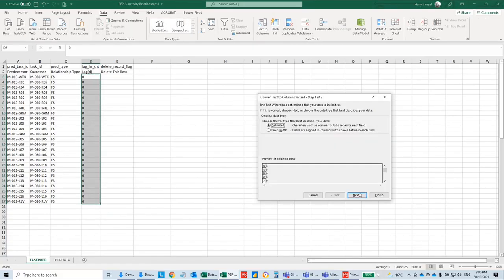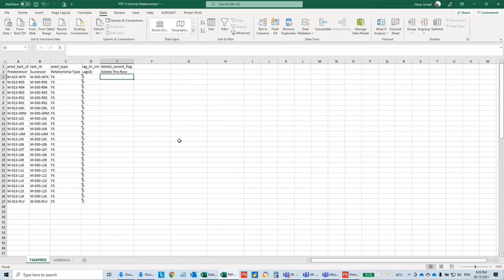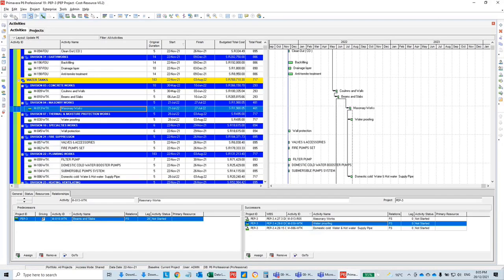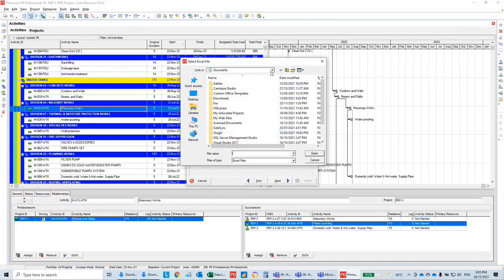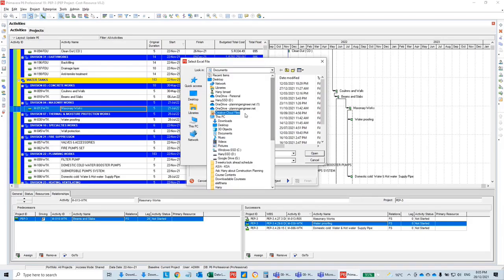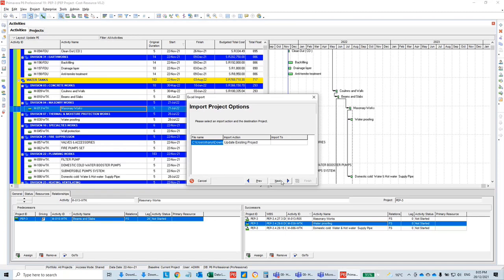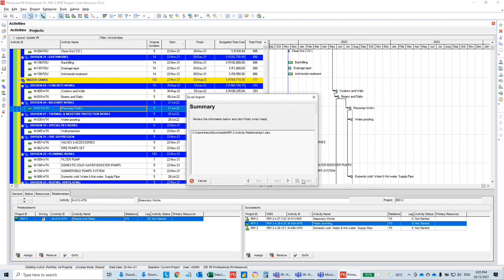Yes, the deleting process is the same as the adding process, with only one simple difference: I'm going to type the letter D here. Double click it, save it, close it, and then here, File, Import, Spreadsheet, from downloads, next, Activity Relationship, this one, okay,